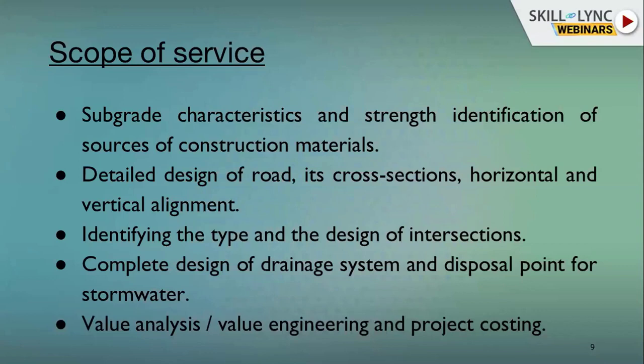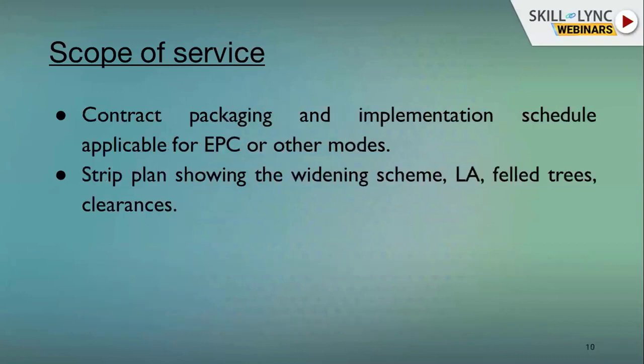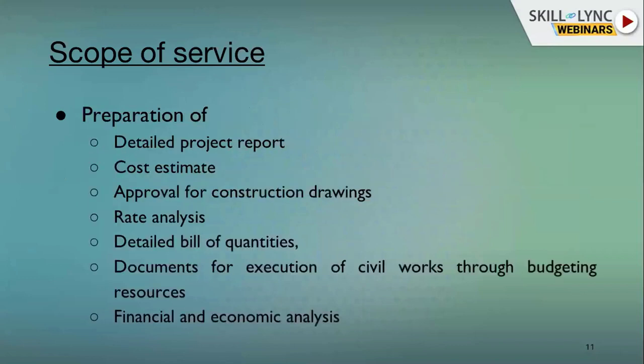Value engineering is, in the DPR stage, we can give 2-3 options, and which is the most economic option, and which will give an advantage to the client, is the value engineering. And from that, we frame up the project cost. Once cost is finalized, scope covers contract packaging and implementation schedule, EPC mode or any other modes. The strip plans showing land acquisition, how many trees are felled, clearances, everything.